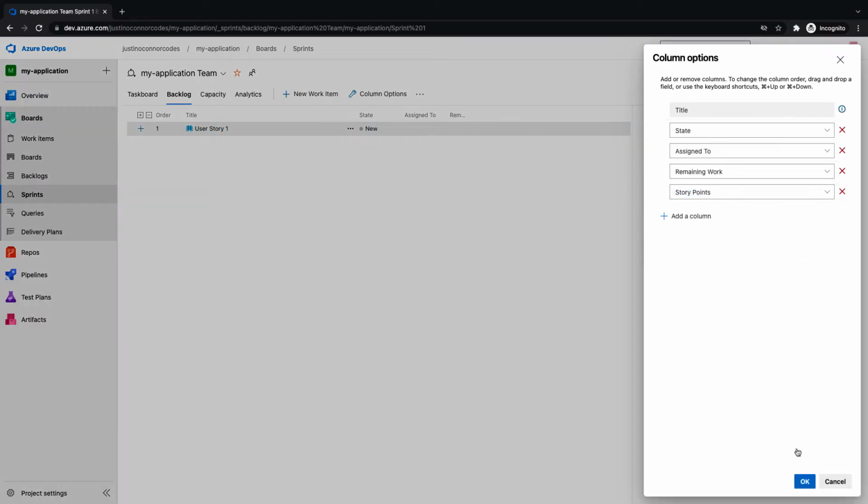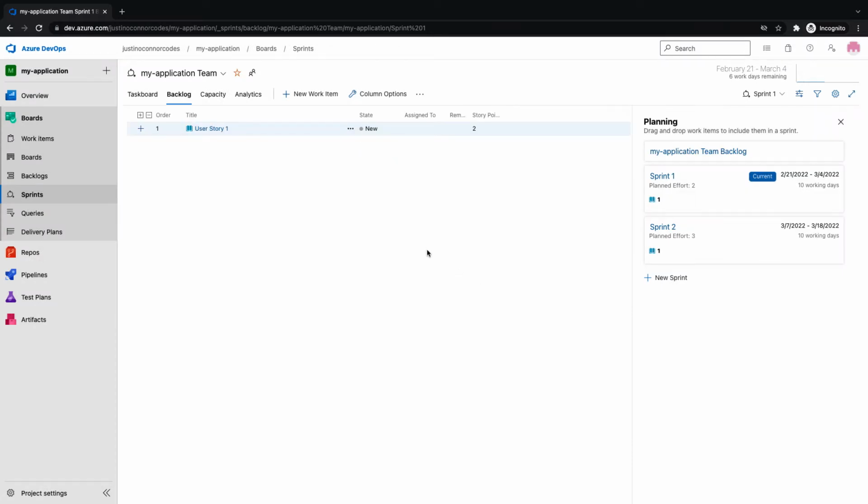As a part of sprint planning, you'd be like, okay, which stories are we going to do? Who's doing them? And then over a couple sprints, you develop a velocity, and you can look at that and say, how many points can we reasonably do? This is a really key part, I think, of Agile, where if you really want to get people out of the waterfall mindset and get them to trust your process, you have to demonstrate to them that your process works. And that means when you make a commitment, that you can deliver on that commitment. So getting really good about this is important.